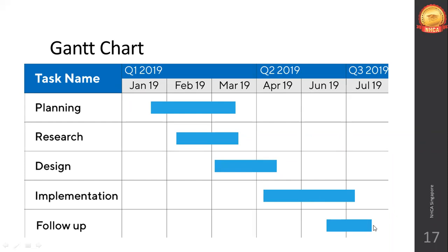Okay, in follow up media relations, you will submit your conference segments piece by piece to the media. Okay, that's how the entire Gantt chart works. So just by looking at the Gantt chart, you will understand from starting to end at what point of time you have to start this category of work. It should not be delayed more than that. We should not start before this, otherwise it will cause a lot of haphazard, confusing situations.